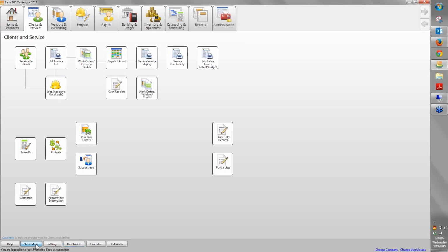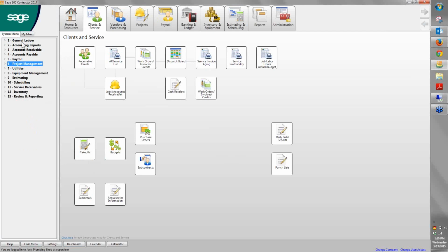Now, if we go to the menu structure again a little bit, so we have the normal general ledger, AP, AR, our financials that you would expect in such an integrated system. Payroll, of course. Payroll allows us to be able to job cost individual payroll by hour, by cost code to each job. And we're able to fully burden the jobs. So if you're paying for the medical, you're paying for part of the Social Security, we're able to fully burden those jobs so you can see the true cost of that employee working on that job site, which then gives you true margin profitability analysis.